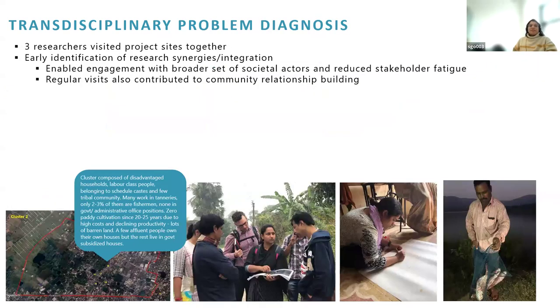So what worked in this project? Let's reflect a little bit on that. In our problem diagnosis, we really approached it as best as possible from a transdisciplinary approach. So the three of us researchers always visited the project sites together. We conducted all of our field research together, and that was really beneficial because it helped us identify early research synergies and integration opportunities.